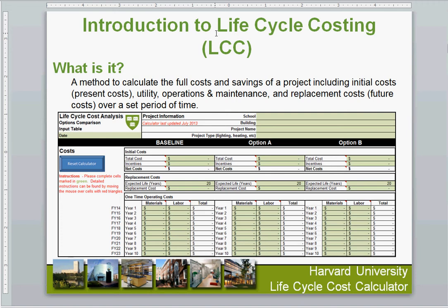So the 20-year assessment was done to highlight the length of time that much of the equipment we would be analyzing related to energy conservation measures will last. Mechanical, HVAC, those sorts of equipment, solar panels, all tend to be somewhere within a 15 to 25 year range. Obviously there are exceptions to that, but as a general rule, it's a pretty safe assumption.